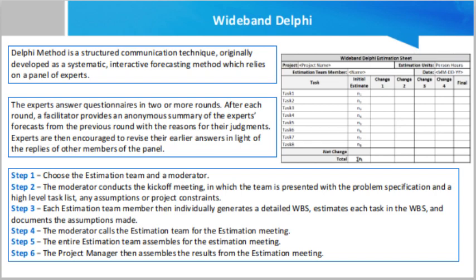The Delphi method is a structured communication technique originally developed as a systematic interactive forecasting method which relies on a panel of experts. The experts answer questions in two or more rounds. After each round, a facilitator provides an anonymous summary of the experts' forecasts from the previous round with the reasons for their judgments. Experts are then encouraged to revise their earlier answers in light of the replies of other members of the panel. It is believed that during this process the range of answers will decrease and the group will converge towards the correct answer. The process is stopped after a predefined stop criterion, such as number of rounds, achievement of consensus, and stability of results.